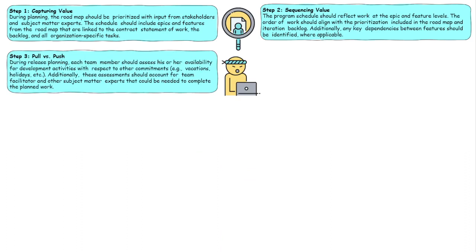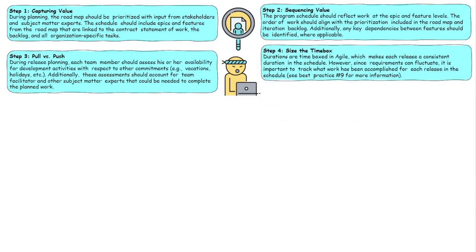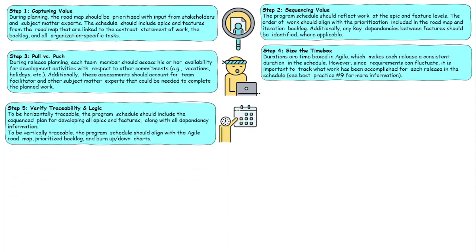Number three: push versus pull. In the world of traditional, we rely on assigning resources to tasks, but in the world of Agile we use a pull mechanism. What I mean by a pull mechanism is we pull the work to ourselves. Pushing work to people is a different mindset. When the work is pulled, you're taking ownership and you know that you can do the work, and you know that that work can be decomposed as appropriate. Number four: size the time box. When you're looking at work, the question is will it fit within the time box? It takes away the need for abstract scheduling like we do in the world of traditional.